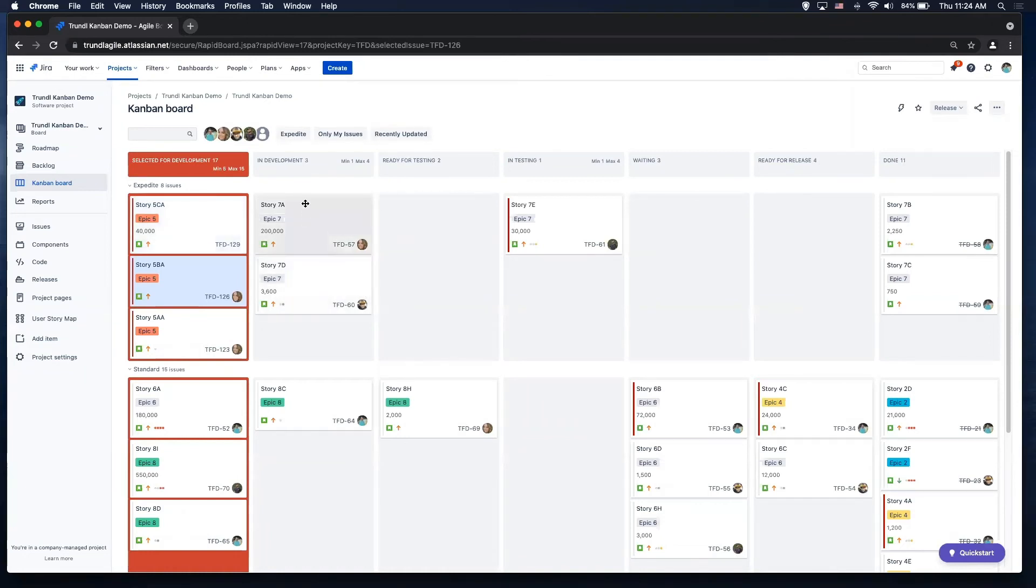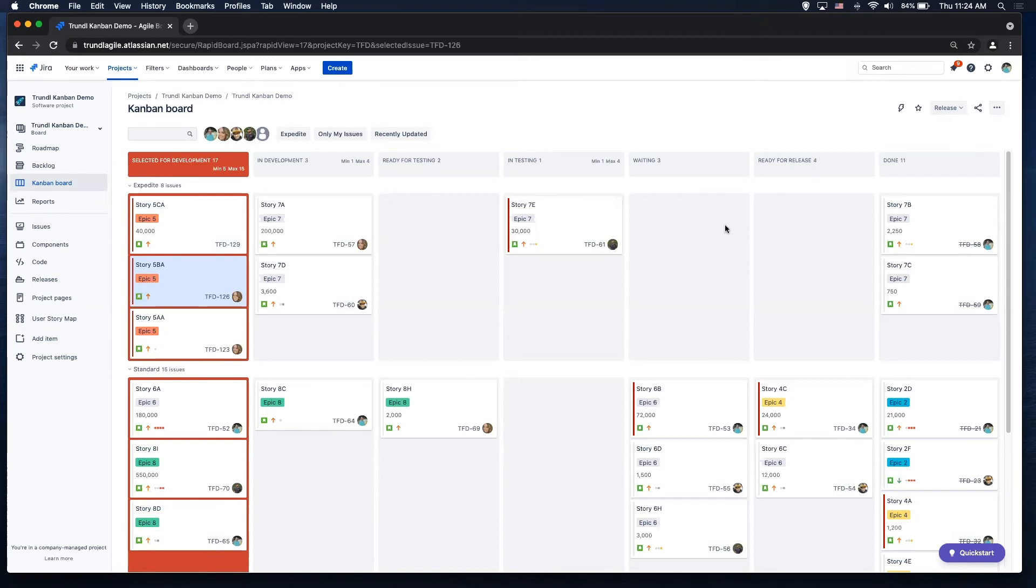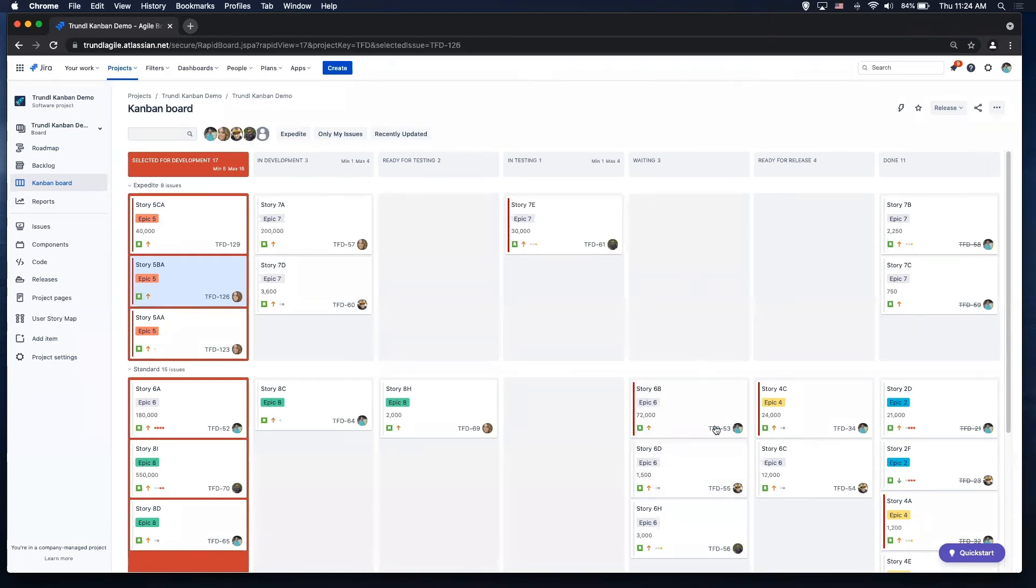And you'll notice then I have my in development, then I get the ready for testing, another hold status, then I get in testing. The waiting status I'm using here, which I added to my workflow, is to basically put in there anytime I'm waiting for something like a vendor, I'm waiting for something like a teammate, maybe a manager's approval. You could throw it in here and you want to be able to calculate your wait time.